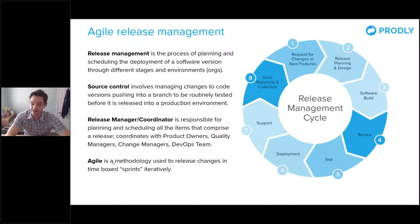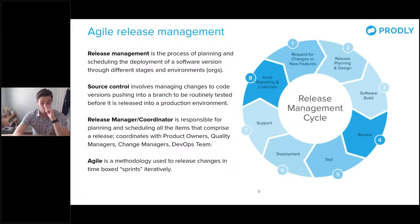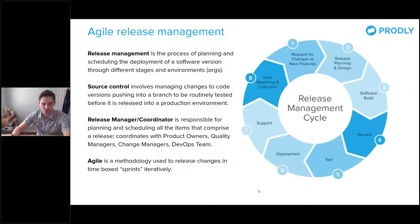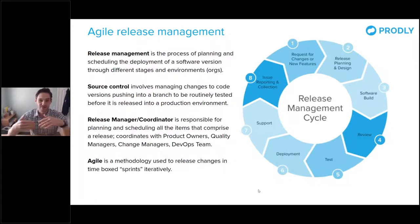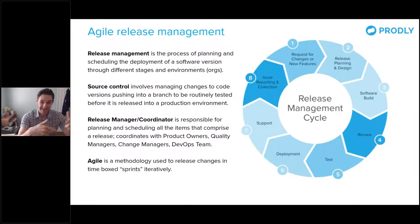The release management cycle is highly involved — that definition doesn't do it complete justice. In practice, it takes a lot of work, teamwork, collaboration, and rigor to execute successfully. There are always lessons you can learn from past releases. The cycle begins with an intake process, usually a product owner gathering requirements from the client. The intake of product requirements, the building of those requirements into stories, the prioritization of stories into a sprint cycle, and the handoff to the development team — which takes it through iterations and pushes through the various environments so that software can get into the hands of the customer.